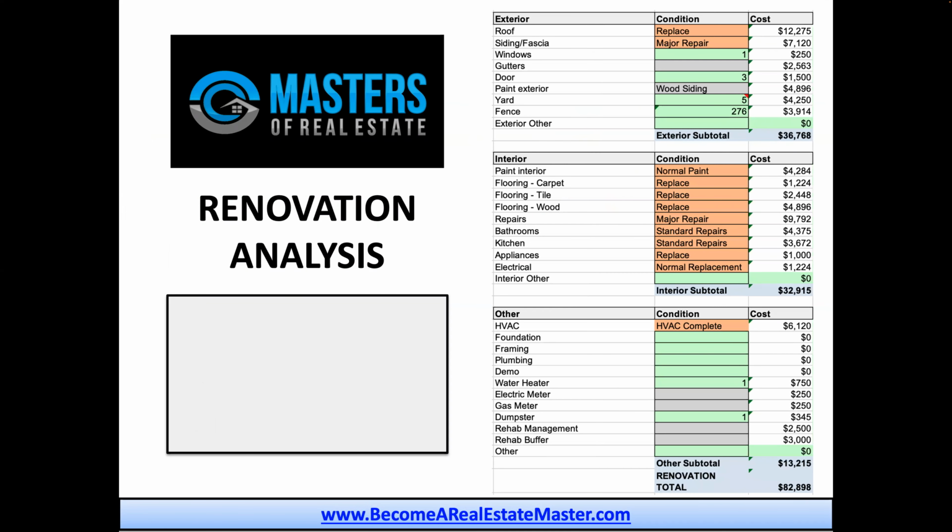And so what I typically do is I have this quick and dirty analysis where I have borrowers go through, or I do this on my own deals, where we go through and say, okay, let's outline all the major systems, the exterior, the interior, and other, with regard to major systems involved and appliances and HVAC systems. And then looking at the interior, what general repairs need to be done, what kitchen appliances need to be replaced, what kitchen cabinets and all that stuff in the kitchen, the lighting, the exterior aspect with the gutters and the fascia and the roof, and the yard is a big one, and even door locks and things like that can add up.